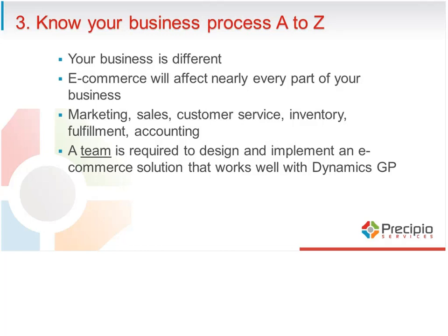I had a client that appointed one person as a project manager, and they didn't have a supporting team to help her out. And so she was really challenged trying to answer all of the questions about orders and process flow and how certain inventory was going to be handled, how do they deal with this transaction situation. She didn't have the supporting team, so she had to constantly go back and forth to individuals and try to figure out who was going to be able to answer that question. And so I'd recommend up front recognizing that you will need to have multiple subject matter experts to support any project manager you appoint.